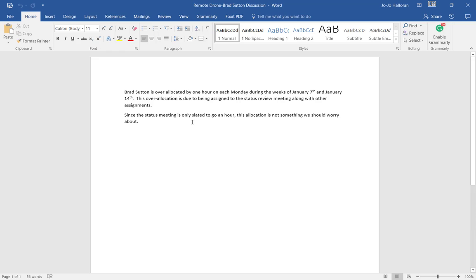And since the meetings are only slated to go an hour, the allocation is not something that we should worry about. So this would be something to go to the project sponsor or the PM to let them know it's not a critical allocation, that he can probably still attend the meeting and get his work done.